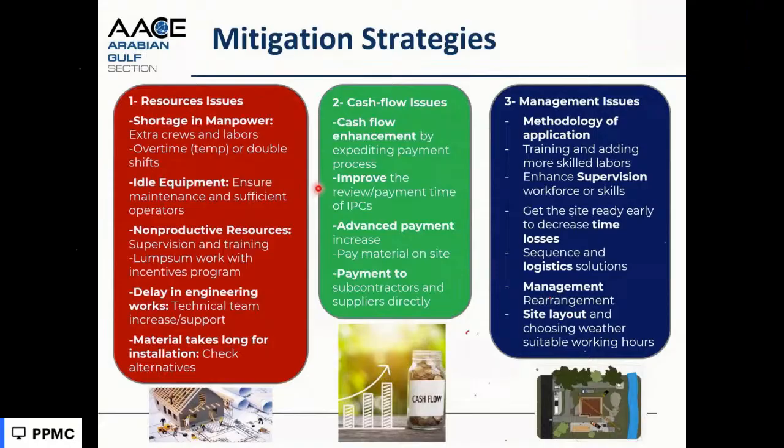Yeah, because they have a requirement that a certain percent of activities should be on the critical path. In some projects it is not possible, even for the relationships. But I agree with you. On the critical path, you need to consider not having many activities, because if you increase some resources to make a better arrangement, you will have fewer activities on the critical path. Right.